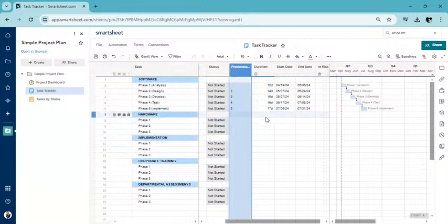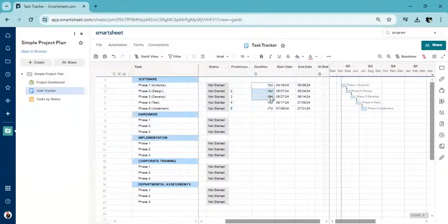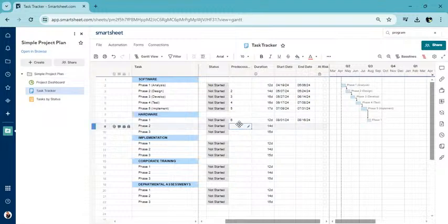So same for this. We could just take these as dummy, put them here. And this is how you will track like 5 projects, 1 spreadsheet, minimum amount of information. Remember how we do this? We're going to make this a predecessor. So this should be 6, and then 7, and then 8. Did we get it? 6. Oh, this will be 8 and 9. Like that, if they are really joined in that way.